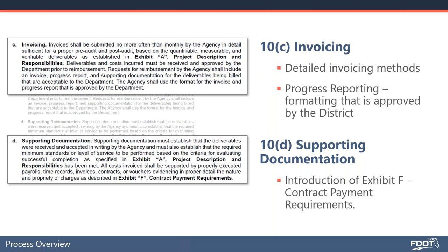So again, from your PTGA in regards to the invoicing requirements, you are required to submit at least on a quarterly basis, but no more often than a monthly basis. So we understand that there may not be enough activity on a monthly basis, and it could be very difficult, especially if you have a lot of open projects with the department. However, we do encourage, and it is required per the PTGA, that you submit on a quarterly basis.